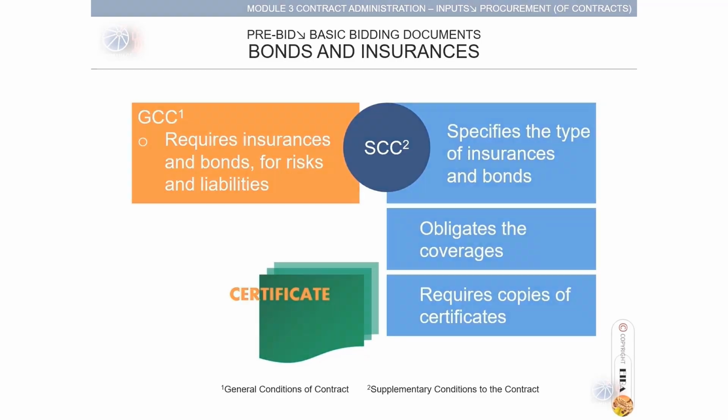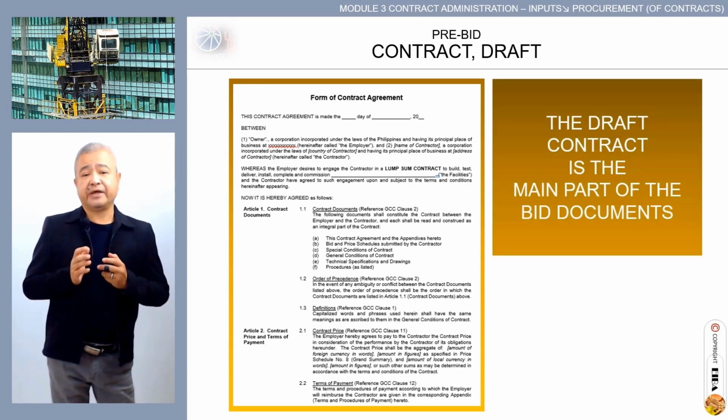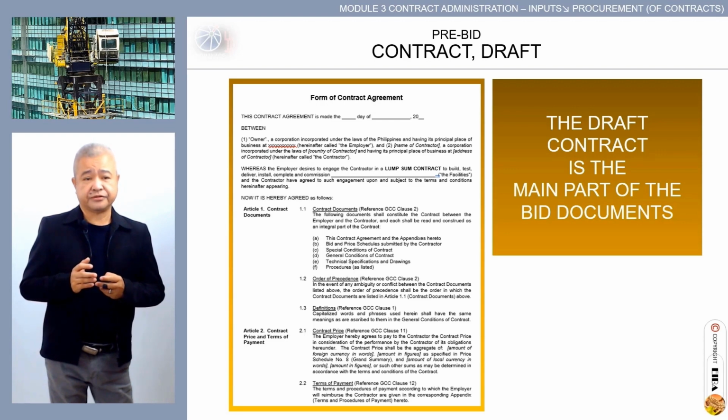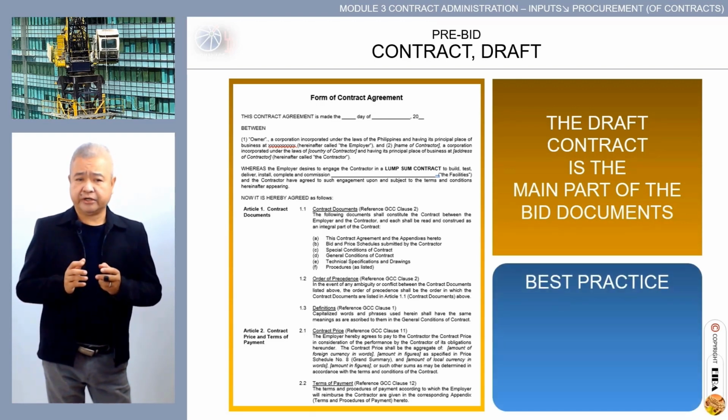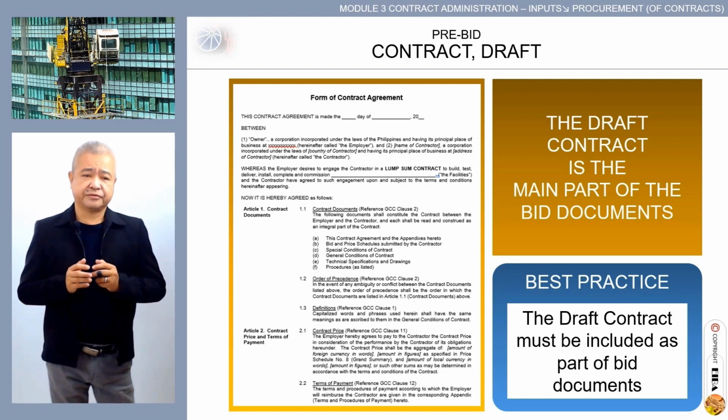This is a sample of the form of contract agreement, usually a form of several pages. The draft contract is the main part of the bid documents. A best practice on your part: the draft contract must be included as part of the bid documents. Bear this in mind.